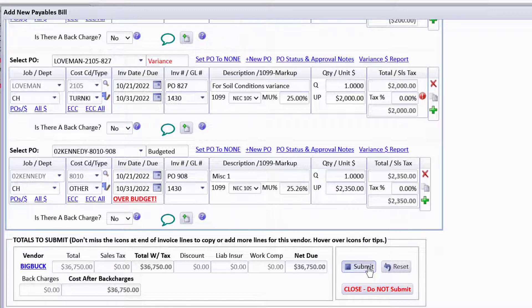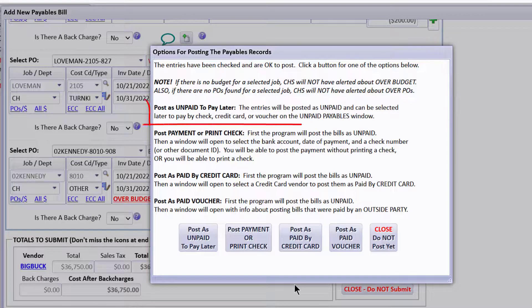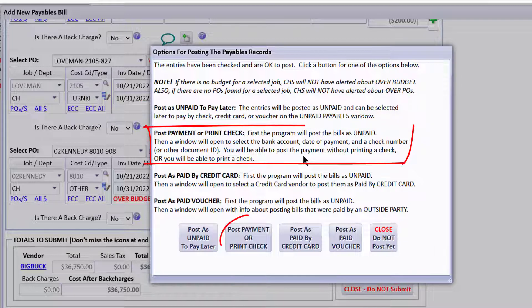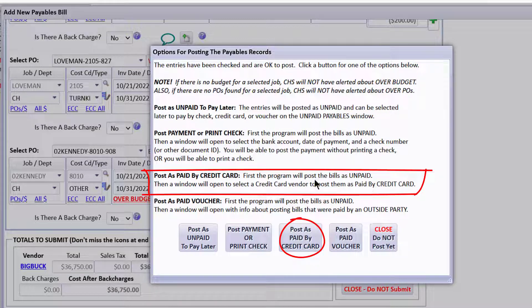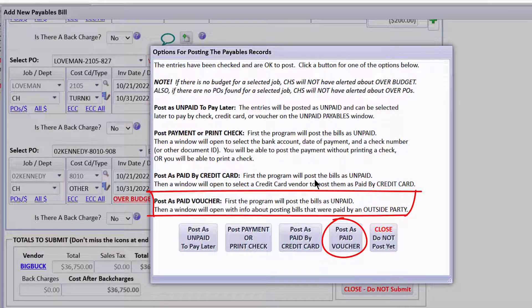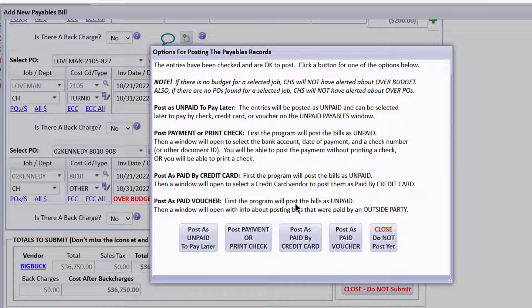Let's go ahead and submit all of these as unpaid and ignore the warning. When you submit, you get options: post as unpaid to pay later, print a check for the total, or mark them as paid by credit card. If your customer paid for something on their own, you might post it as paid by voucher — that increases revenues received from the customer and increases the cost, with no effect on a checking or credit card account. In this case, we're going to post as unpaid to pay later.